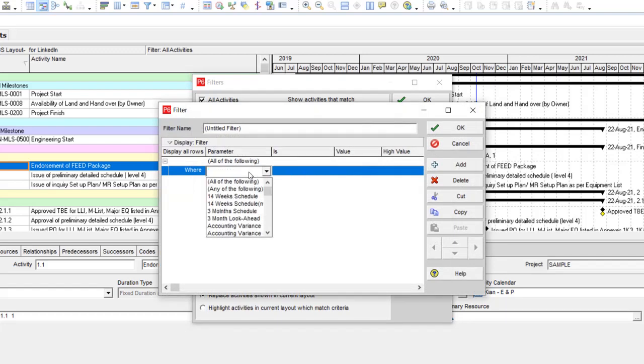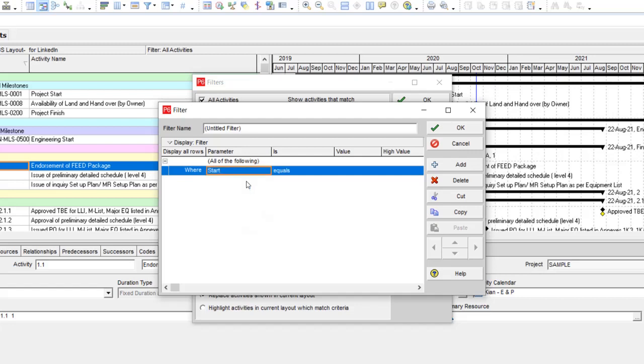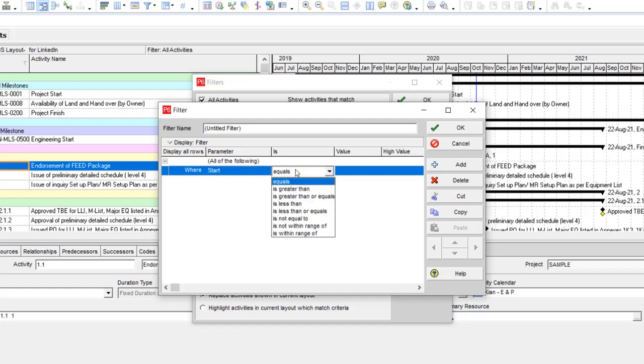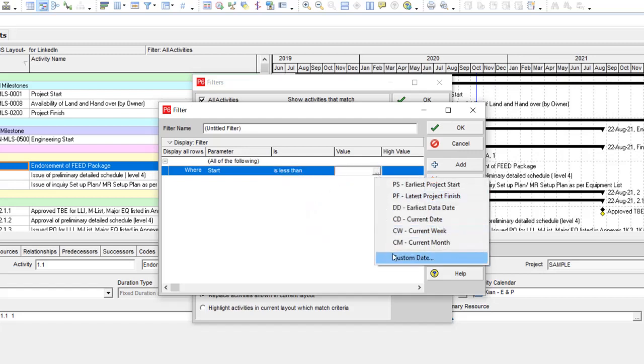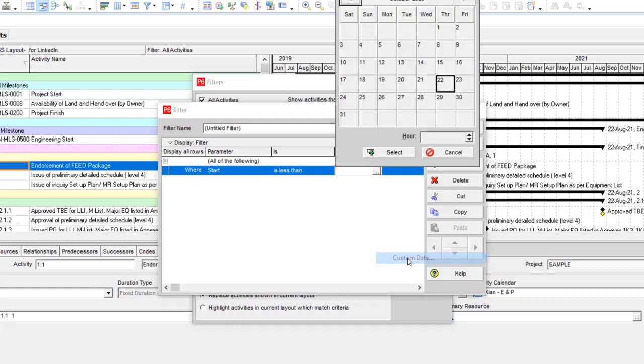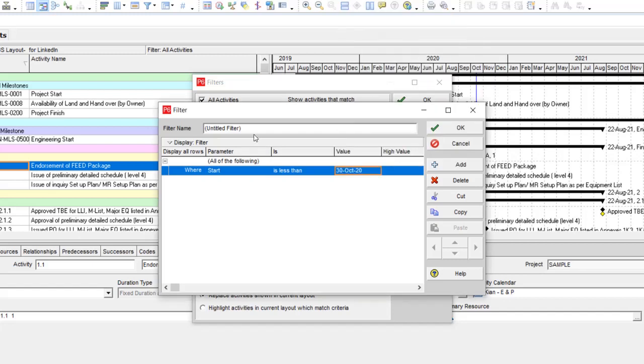The first thing you need is the project cutoff date. My project cutoff date is about October 15th, so I should use start is less than my custom date. My custom date, for instance, is October 13th. I want to prepare a two-week look-ahead plan.